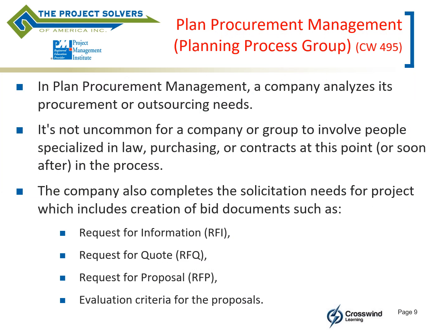Now, as I mentioned, plan procurement management, the first process. At this point, PMI would expect that you would be working as the project manager in conjunction with a legal person that has been appointed at your project by your company, and that could be somebody in purchasing, but generally you wouldn't be the one who would be in charge of the contract itself or writing up the contract itself, but you would instead be working in conjunction with this person,